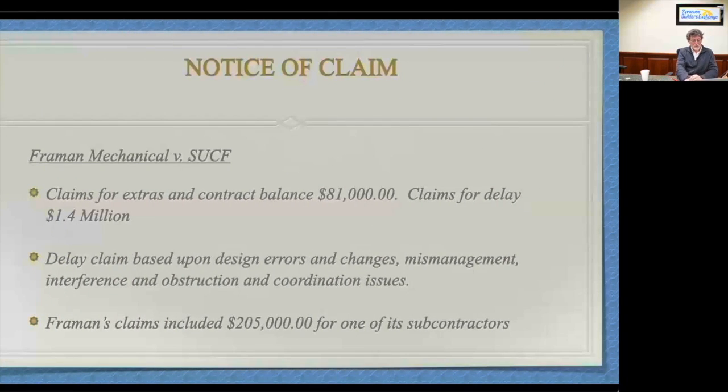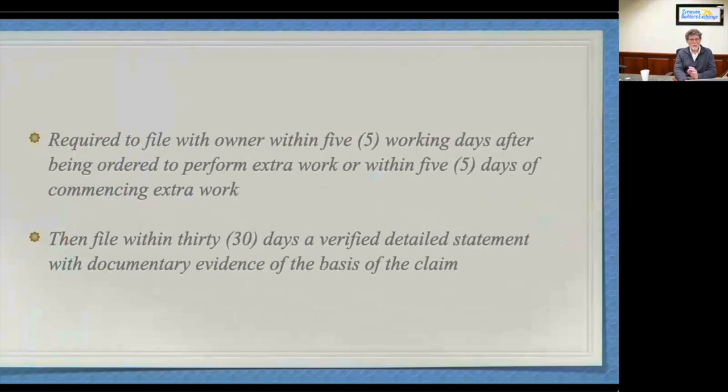These are some notice of claim cases for you to look at if you want to. Freeman versus SUCF, which was later reversed on appeal, but on different reasons. Delayed claim loss, which included a subcontractor's claim of $205,000, and it got lost because Freeman didn't give notice of claim in a proper and timely fashion under the SUCF contract document. Okay. That's what happened. All claims dismissed.